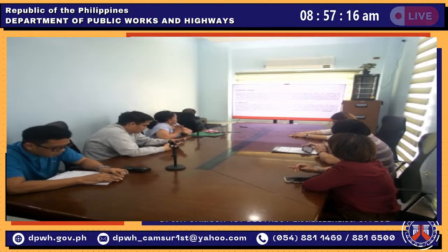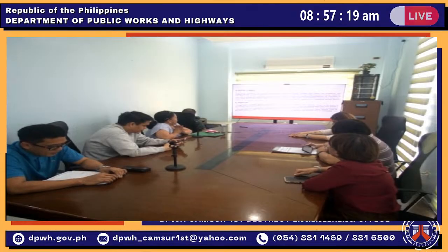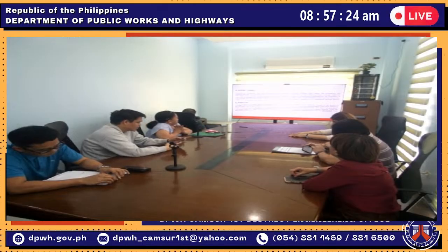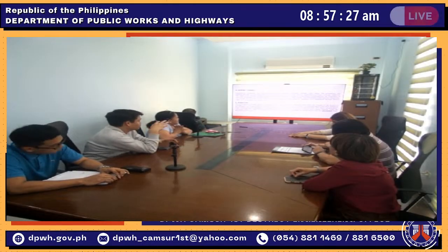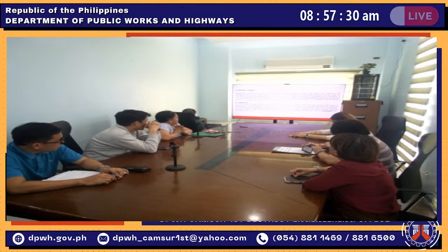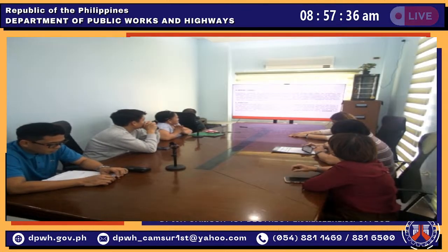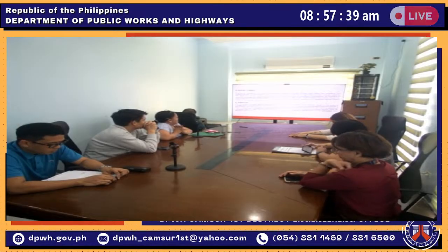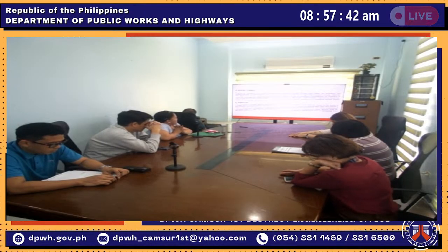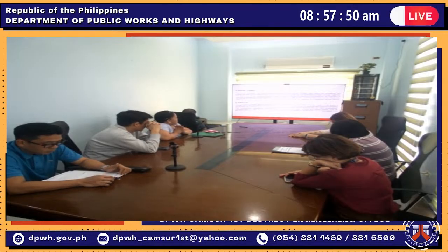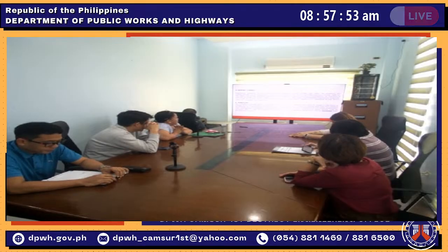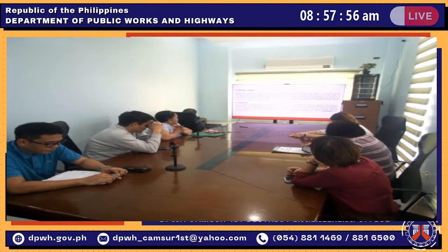For the duration, the consultancy service shall be completed within 32 calendar days from the receipt of the notice to proceed. The consultant shall submit an inception report within 3 working days from NTP detailing the schedule and methodologies of field surveys, laboratory testing, hazard assessment, and report preparation. Field investigation, topographic, geologic, hydraulic, and soil survey, analysis, and report writing must be concluded within 21 days. The processing time for the review of EGGAR by DENR MGB shall be excluded from the prescribed timeline.